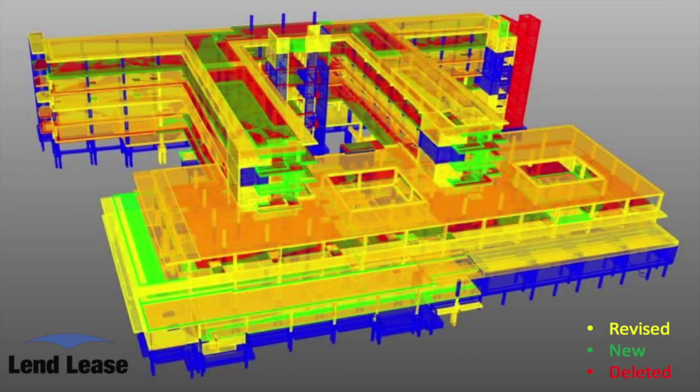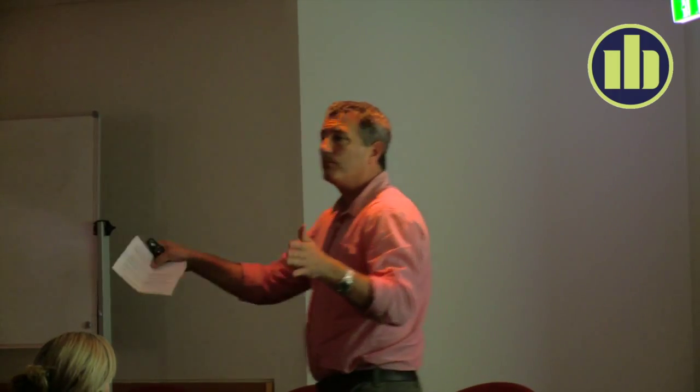The old school way of working is we'd freeze the documents 6 weeks out from tender. We continue to finish off our bill of quantities. By the time we issue our bill, the drawings have moved on. Clearly there's an undermeasure in the bill. So you'd end up with errors between the bill and the design, only because they weren't done at the same time. With this sort of stuff, we revisioned the whole structural package in a day and a half. Day and a half. Here we go.